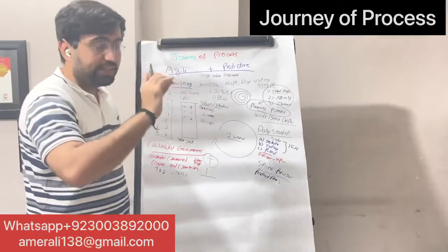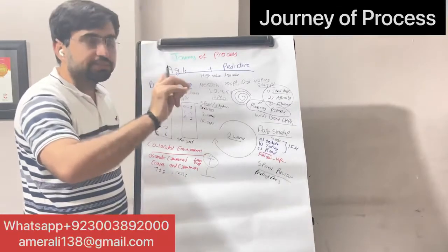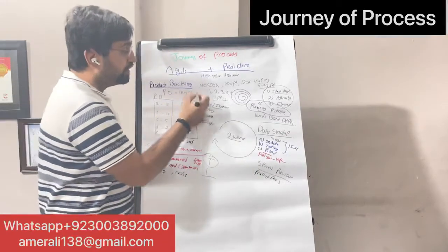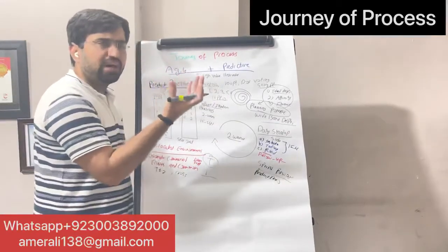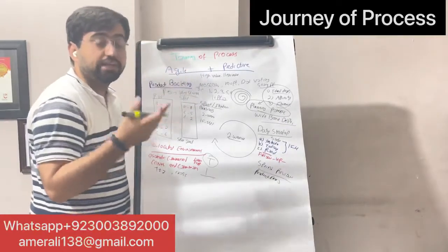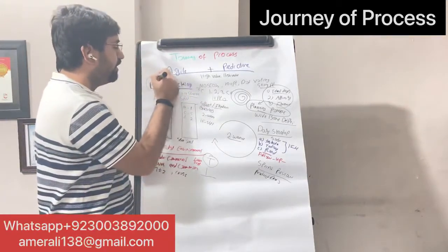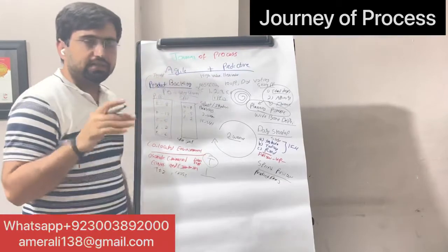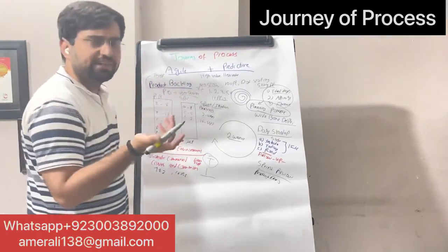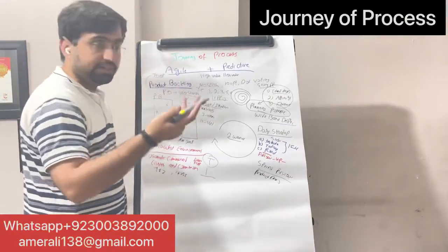Your checklist is done. Everything in the checklist, like this must be in the product, this must be in the product, and of course user stories help you, because user stories work in 3C. You write them on cards for easy working. There is a conversation on this, and there is a confirmation criteria on the user stories. User stories also follow the acronym INVEST. They are independent, like one user story does not depend on another user story. You can negotiate them. They must provide value. They must be small so that they can be completed in a sprint, and they must be testable.